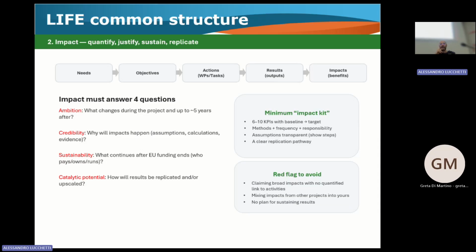It's mandatory. You have to provide in your proposal that you are able to produce an afterlife project with these resources. It's a formal document that you have to produce, and you have to write in the proposal that we are going to produce the afterlife program in this way.